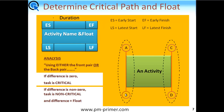Going back to early start, early finish, latest start and latest finish — very often rather than just drawing a rectangle, you'll have a node like this where the top-left number is the earliest start, top-right is the earliest finish, bottom-left is the latest start, and bottom-right is the latest finish. You'll normally have your activity name in the middle, and float is sometimes inserted there too. When you do your forward pass, you're calculating early start and early finish; when you do your backward pass, you're calculating latest finish and latest start.